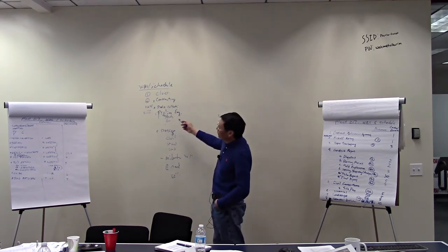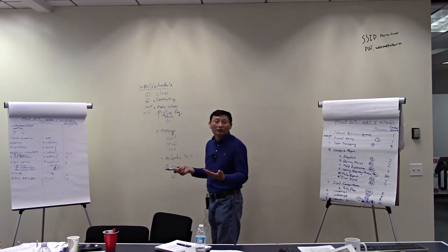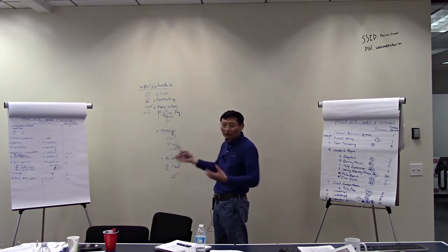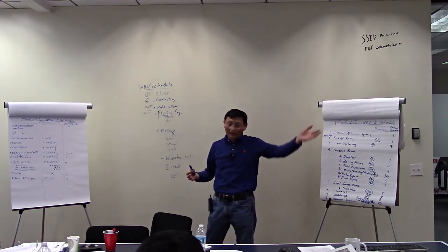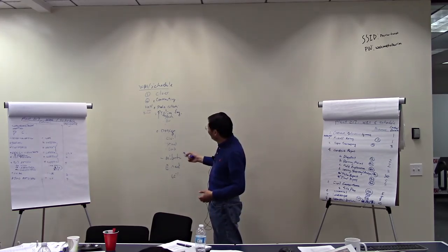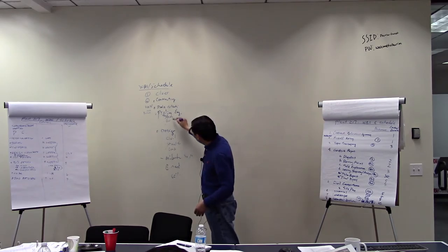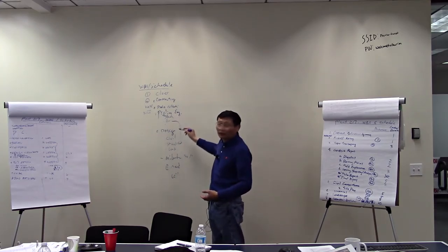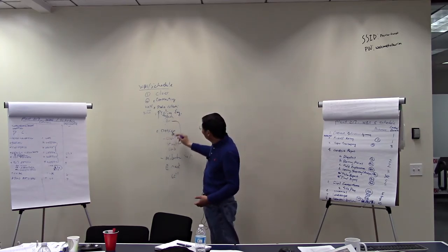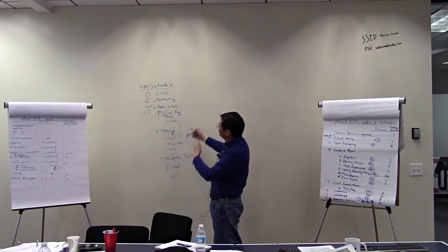To 65%, and go along that. If you structure the flow this way, then you would be able to capture a lot of the tasks, because that's the first thing we have to do, right? We want to dump all the tasks in one place and make sure they're covered. The next thing you would do is the predecessors, how the relationships work. You know, in your head or on a piece of paper or just write on the schedule, that's what stuff is going to come in.